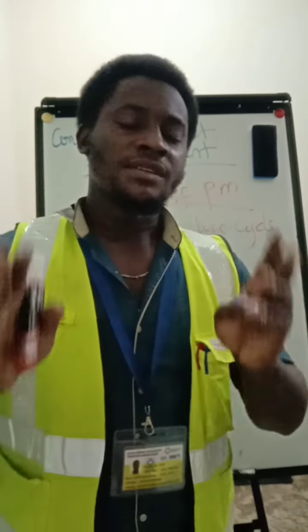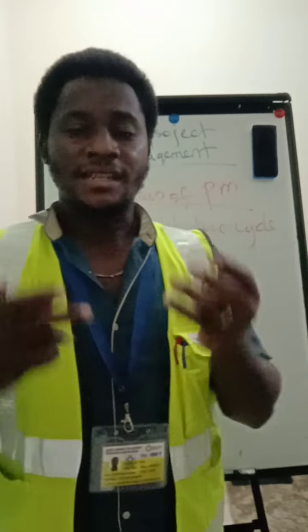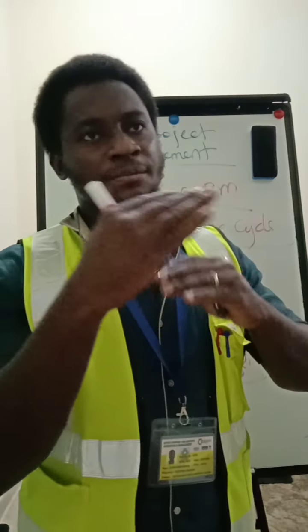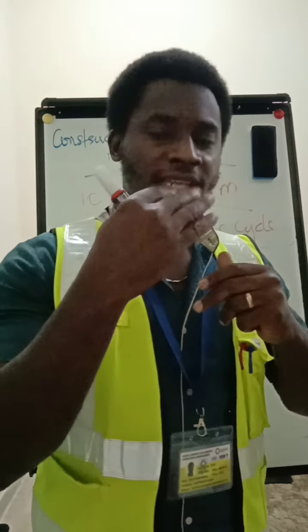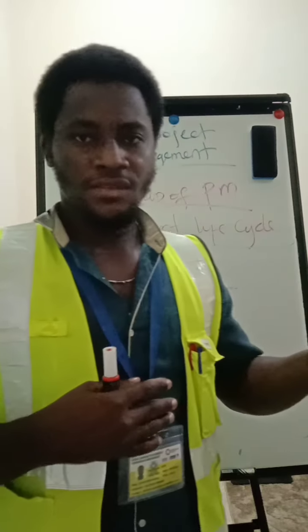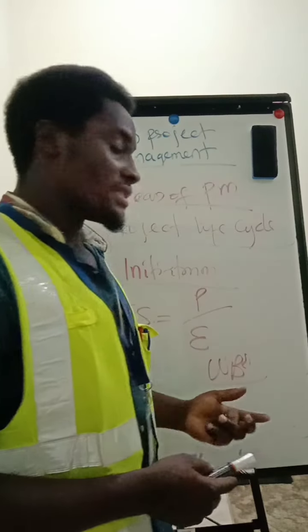Next, we'll be talking about the risk assessment. So we'll prepare a risk assessment or the contingency plan. These are anticipated risks that we are thinking might occur during the execution phase of the project. We identify them and then we also propose solutions on how we can mitigate these different risks if they pop up. So next, we're carrying out pre-designs.